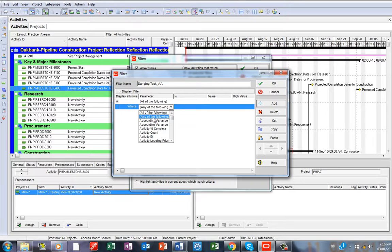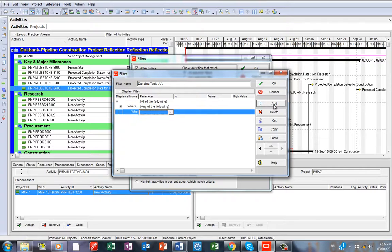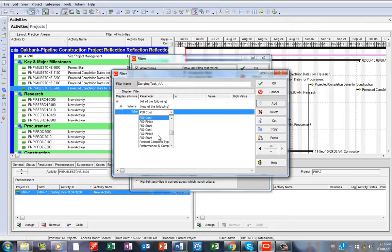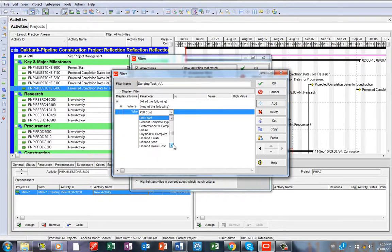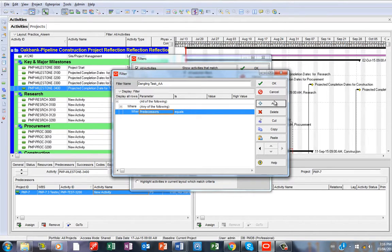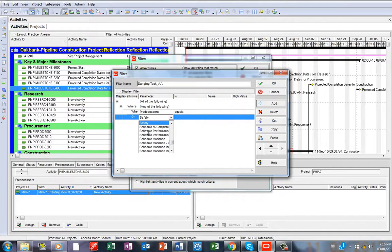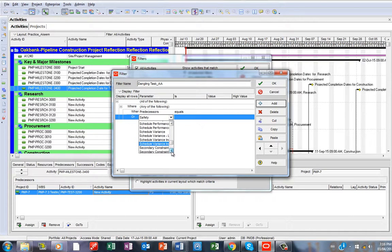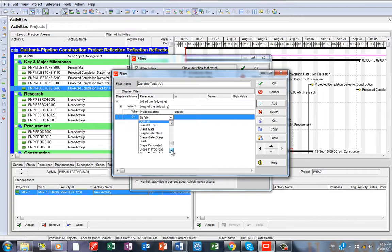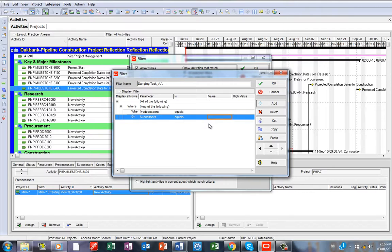Now you say 'where any of the following'—you're looking to say, for instance, if your predecessor equals, then you leave it blank. Then you have again, or if your successor—I mean the succeeding task—equals, you leave it blank again.